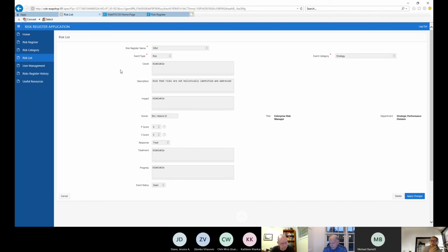When you do risk management on a project, of course it depends on your project, but I was doing it on a monthly basis. So it really depends on the environment you are involved in. On a project, I would really suggest to have it every month, every 6 weeks. It doesn't have to be daily. No. But every quarter I am meeting with the directors, and then I'm meeting with the DGMs, and then I am issuing my quarterly risk report. Great, thank you.